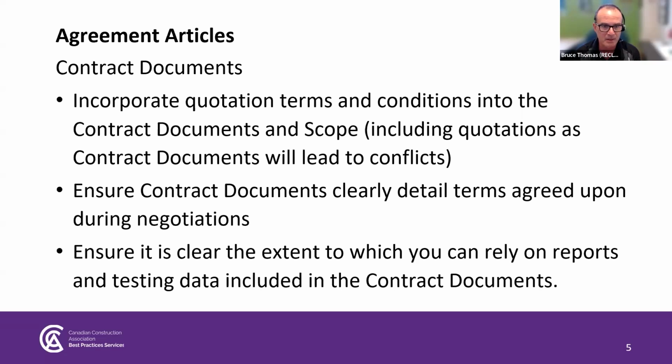So typically our own organization's process is to basically say, no, we're not going to attach the quote, but we will go through it with you and find the items that you think are important, and we'll amend the terms of our agreement so that it's consistent. This will help, potentially, with disputes down the road in terms of clarity.